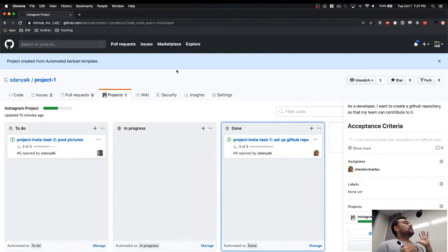As the name says, daily stand-up. Everybody in the team stands for that meeting and they answer 3 questions. That's it. 3 questions and that's all. What did I do yesterday? What am I going to do today? Do I have any roadblocks?